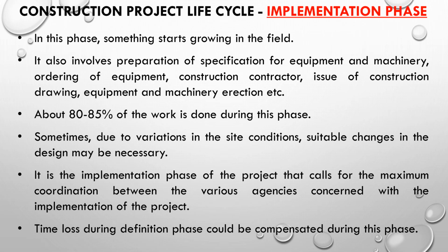Sometimes due to variation in the site condition, suitable changes in the design may be necessary. It is the implementation phase of the project that calls for the maximum coordination between the various agencies concerned with the implementation of the project. Time loss during the definition phase could be compensated during the implementation phase of the project.